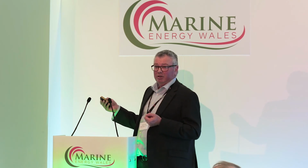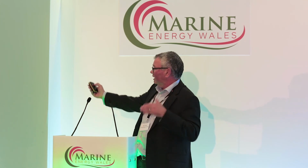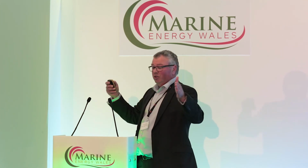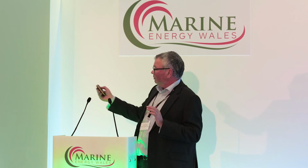Really what we call it is a static production line. Instead of trying to build everything, you're working along a face. As you can see there, you're busy building walls on the right while you're putting turbines on the left. So you work your way along until such time as you've finished all 16 and you've got a watertight structure. Your sluices don't need to be watertight because they allow water in and out.